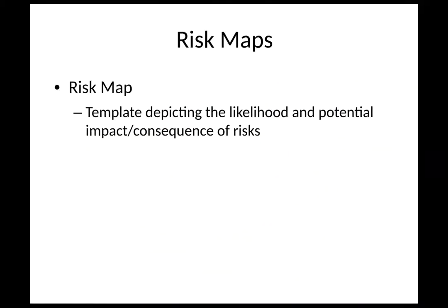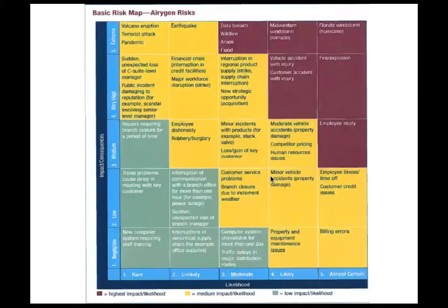Now, what you do is you take this and you actually go to risk mapping, right? And so what we want to do is hopefully visually depict where some of those risks are. And part of this is really wants to display like likelihood and potential impact or consequences of those risks. And from a senior leadership standpoint, this is where it's helpful, because they would much rather look at the figures and say, okay, I can see red is bad, it's up in the high quadrant, and we need to address this, versus looking at all the data that we just saw on the prior pages there.